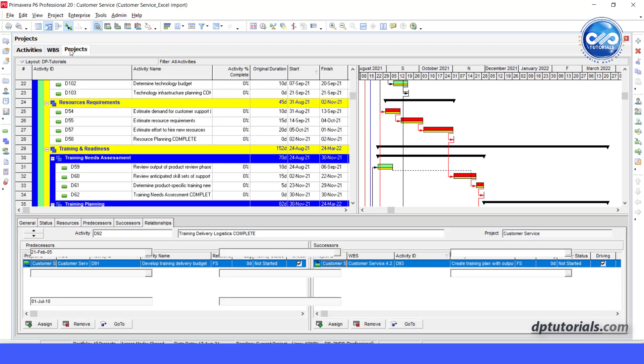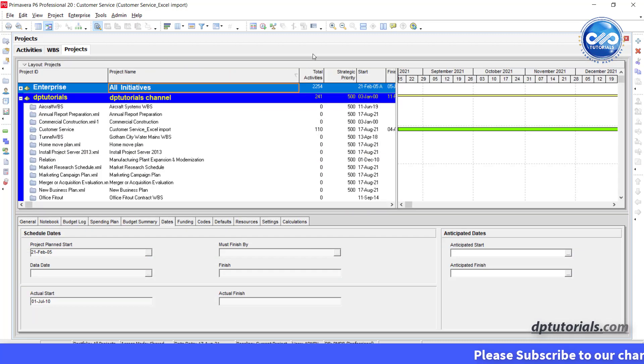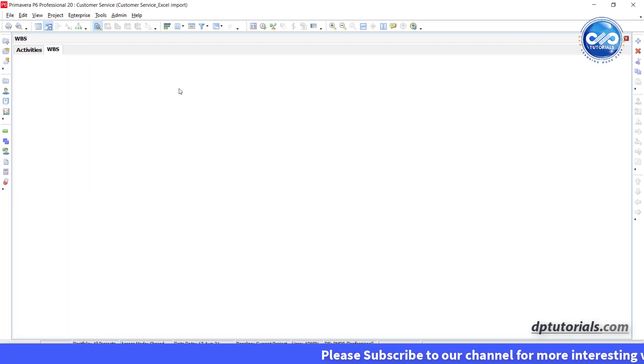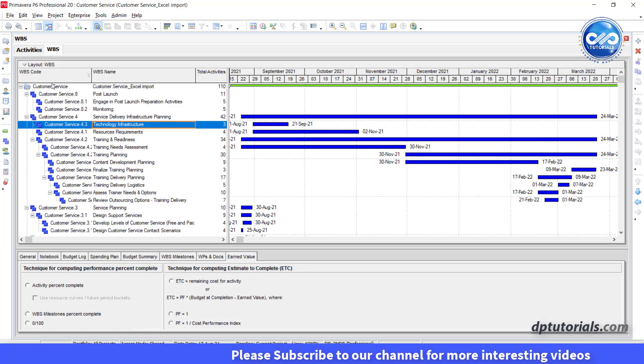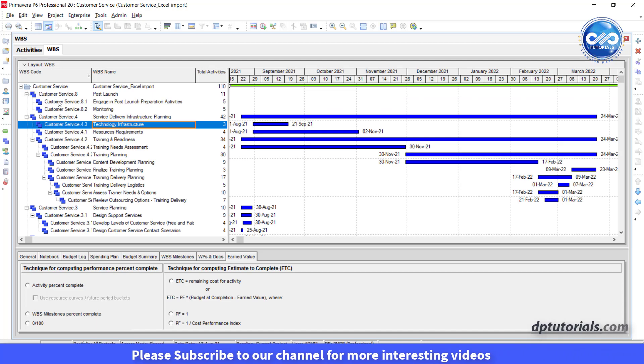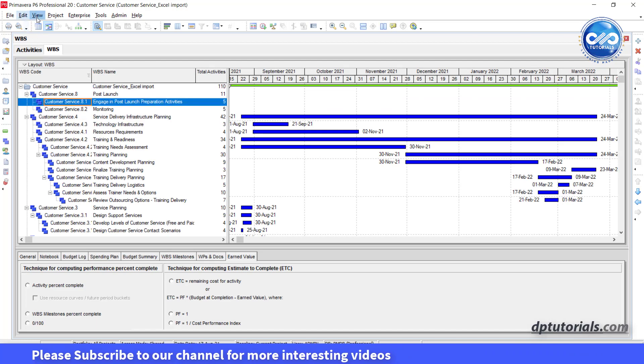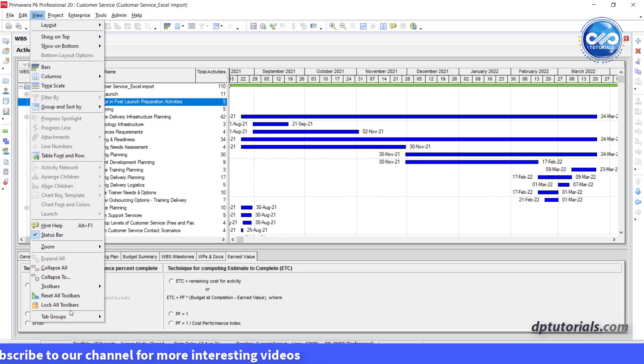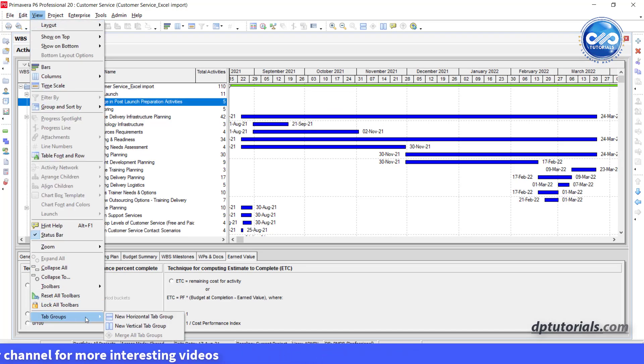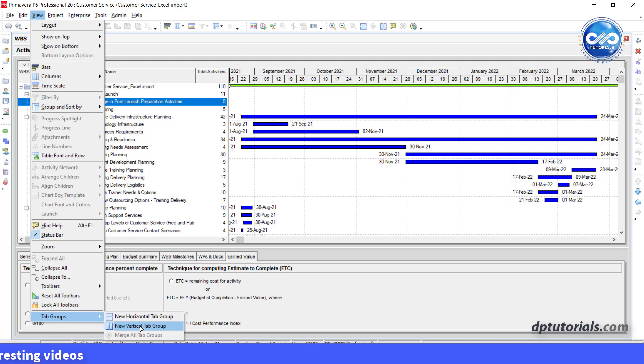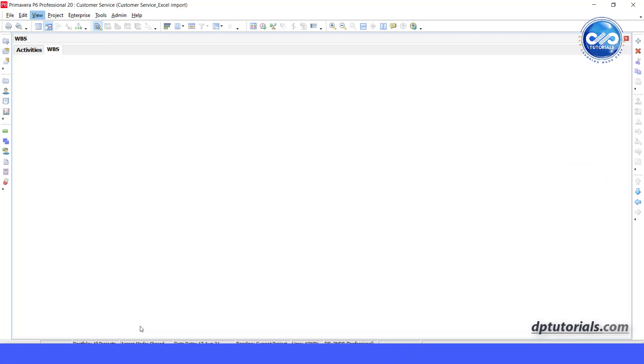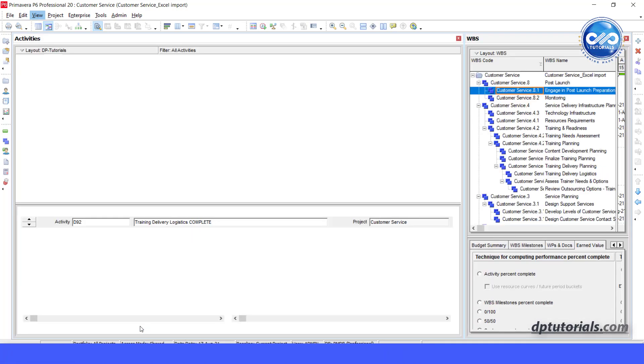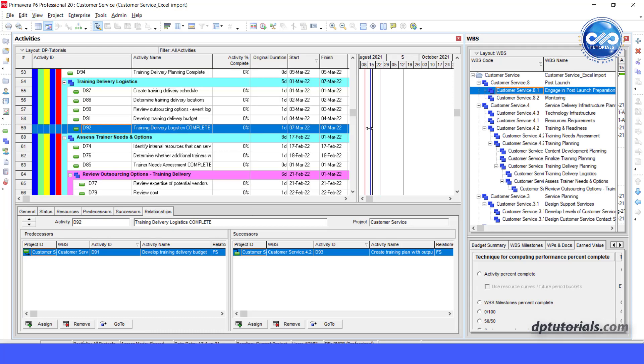Now if you want only the WBS and activities screens side by side, first close the projects window. Go to View drop down menu and go to Tab Groups and click on New Vertical Tab Group. Once you click, you can see the resulting window like this.